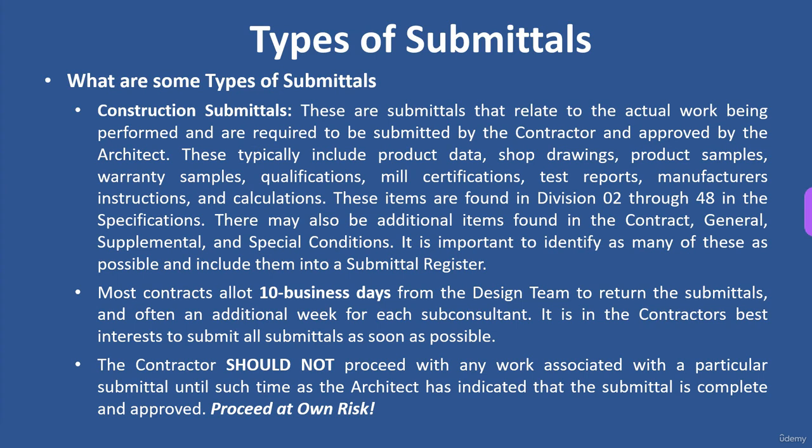Most contracts allot 10 business days for the design team to review submittals, and often they'll add an additional week for each subconsultant. So it's in the contractor's best interest to submit all the submittals as soon as possible. It's always a battle on every project, dragging their feet, and there's no rhyme or reason to it. I just think people are busy subcontracting, and then once they do that, they have to chase the subcontractor for their submittal. So it's important to get them in as soon as possible, but it's also important to prioritize. You want to make sure that you're getting the stuff you're performing now submitted first.